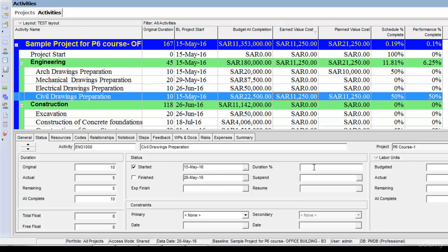Now let's assume the same activity had only 30% completion after five days instead of 50%. Once I schedule it, the performance percentage complete is 30% while the schedule percentage complete is 50%. According to the baseline schedule, this activity should have progressed 50%, but it has only progressed 30% — so this activity is behind schedule. The earned value cost is 30% multiplied by the budgeted completion of $22,500, which gives $6,750. We had planned that $11,250 should have been our planned value cost, but our earned value is only $6,750 — confirming we are behind schedule.